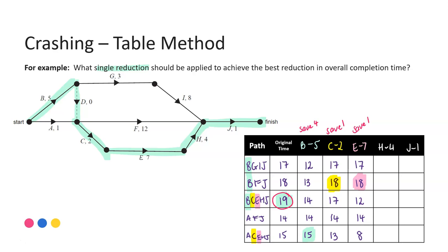Looking at activity H — H is in the third and fifth paths. No change for the first and second pathways. The third one: 19 minus the duration of 4 brings me down to 15. No change for the fourth pathway. For the fifth pathway, 15 minus 4 gives us 11. Our longest path there — 18 — so with H I'm again able to save 1.